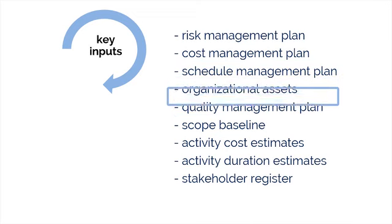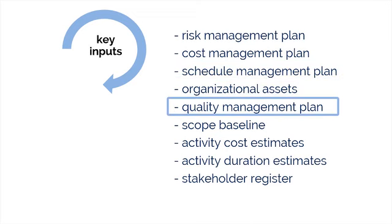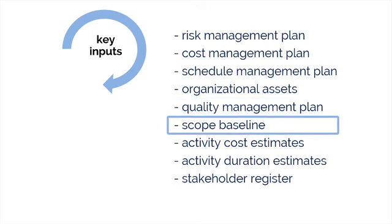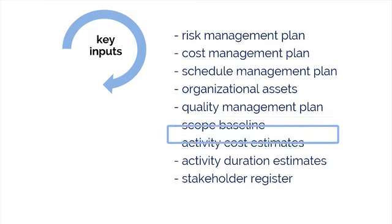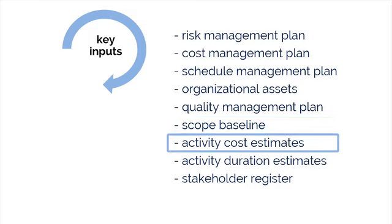Quality management plan — this gives us some measures and metrics for identifying risks. Scope baseline — project assumptions are found in the project scope statement, and uncertainty in project assumptions should be evaluated as potential causes of project risk. Activity cost estimates — this ties our expectations of how much the schedule activities for the project create individual or overall risk. These figures are usually expressed as a range, letting us know whether the estimate is or is not enough to complete the activity.